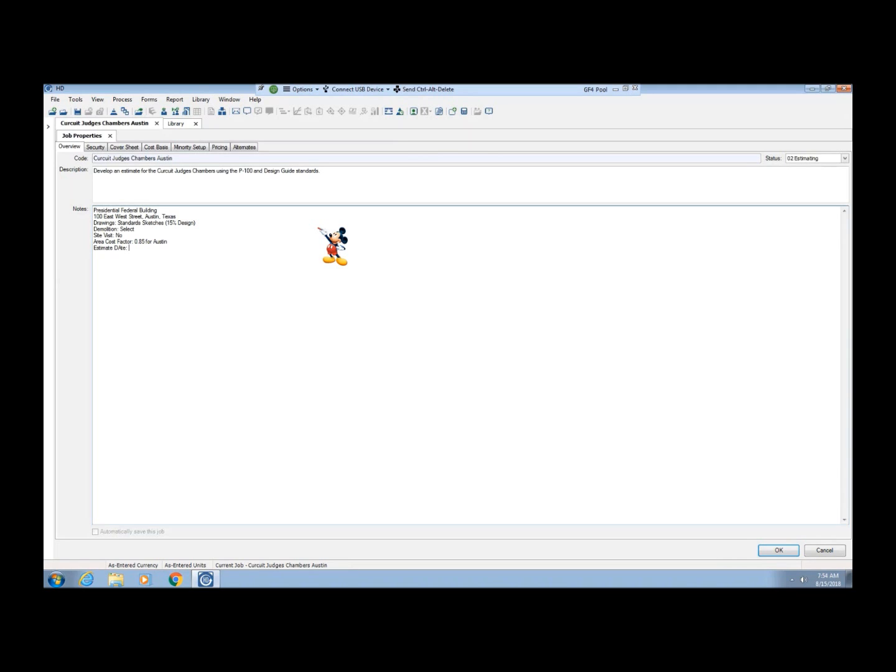We address that as material adjustment or labor adjustment. This is different and separate from the escalation. Escalation has to do with the borrowing of money. So that would be from the award date to the middle of construction. And so we keep it separate, and we make a note of that. We have the material adjustment, labor adjustment. And most of these numbers I'm just guessing at, making up as I go. This is not for any particular project.